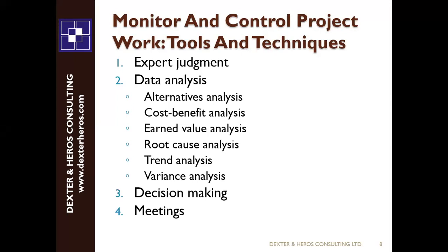It's the method we use to trace back where errors are coming from. Remember the Ishikawa diagram I showed you guys on Saturday? That Ishikawa diagram helps you to recall where errors are coming from. It could be from the management, it could be from the material, it could be from the label that those errors are coming from. You understand? So you just want to trace back and find out where errors are coming from. And of course, you begin to put your control strategy.